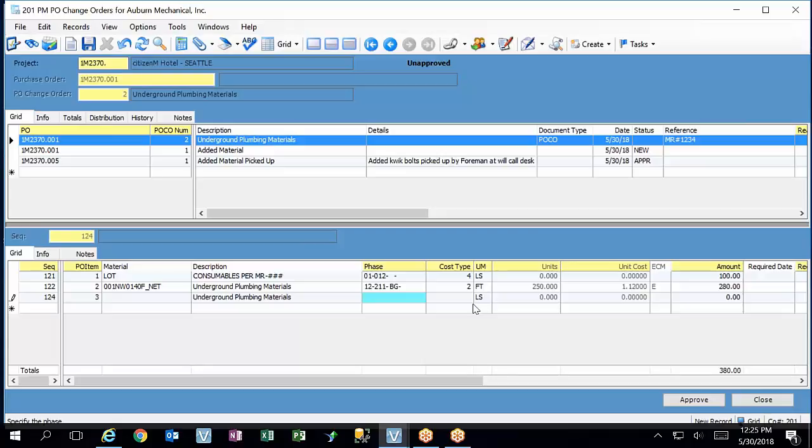We can either adjust the 380 out of our phase code that we created for the change order into their subcontract phase code, or we can leave the money where it is, and when accounting posts the 380 charged by this contractor, they can charge it to the phase code for the change order instead of that subcontractor's phase code. That means when Isaac's looking for everything AirTech charged on Stonebridge Marriott, instead of just looking at their one phase code, you have to look across multiple. I would see if you can do number 2 there. Right here? Can you redo that?